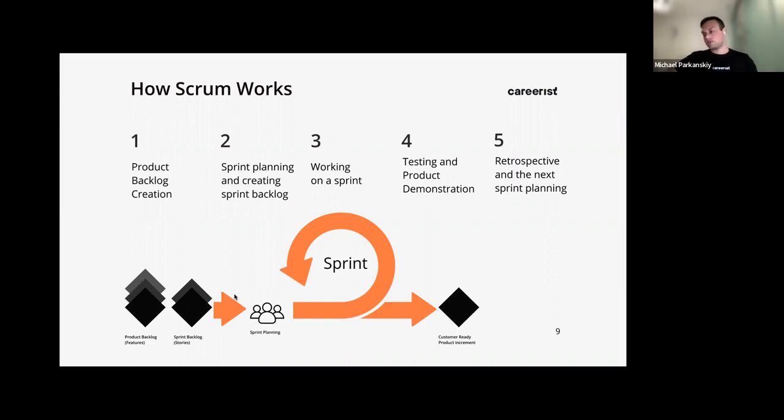And in the next sprint, maybe during your testing, you found a bunch of bugs. And on the third sprint, you're going to get together on a call and you're like, oh, Mike found 50 bugs. So for the next 2 weeks, maybe even 2 sprints, because he found so many bugs, 1 sprint is not enough. We're going to need 2 sprints to fix all of the bugs. And for the next 2 weeks, you and the developers are going to address all of the issues that you found. And that's how sprints are organized.